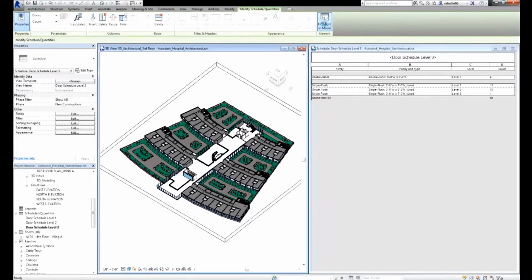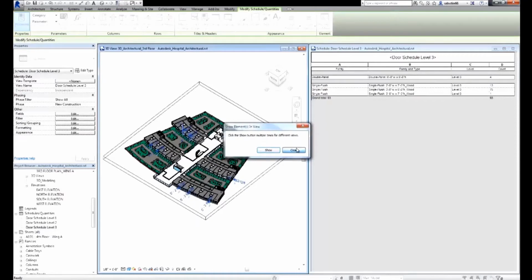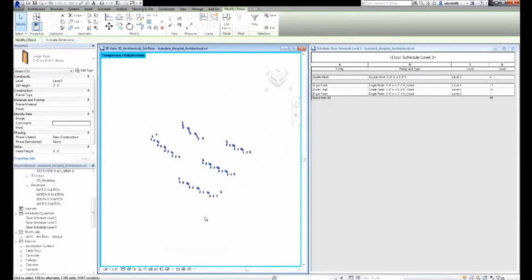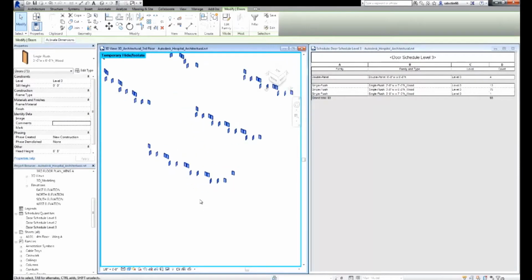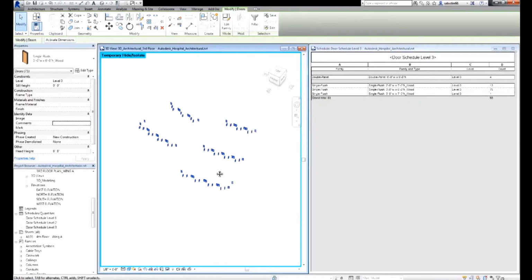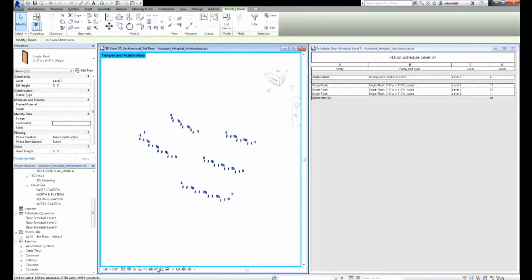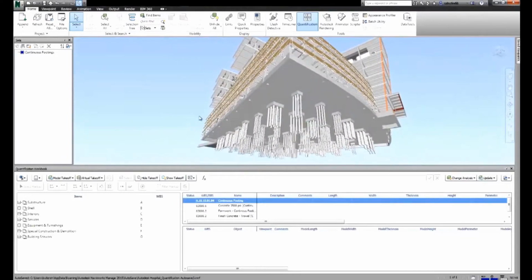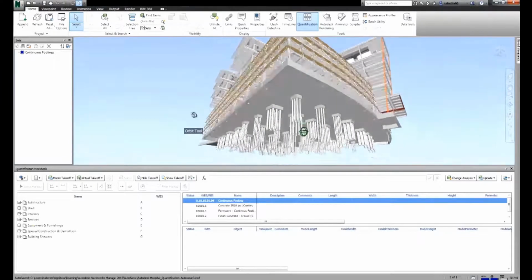Here we can see how the Autodesk solution provides several ways to gain access to the quantity information early in the planning process. By leveraging tools directly from Revit and Navisworks, we can quickly get a high level of understanding of the project quantities. Schedules or tables of data built from the 3D model created by the designer can be used by adding counts and totals, or a custom table can be generated on the fly to give you feedback and quantities from the model information immediately.